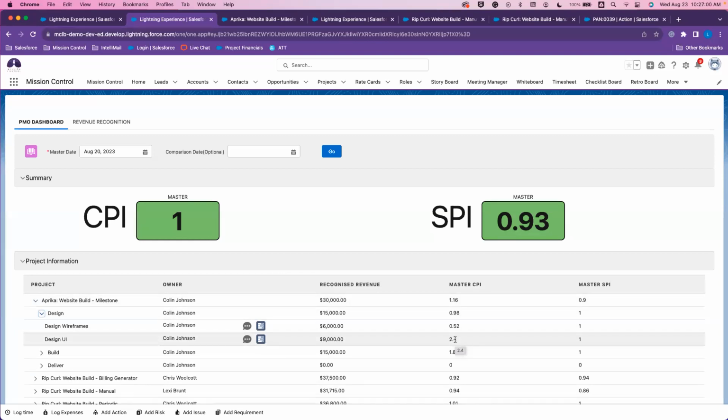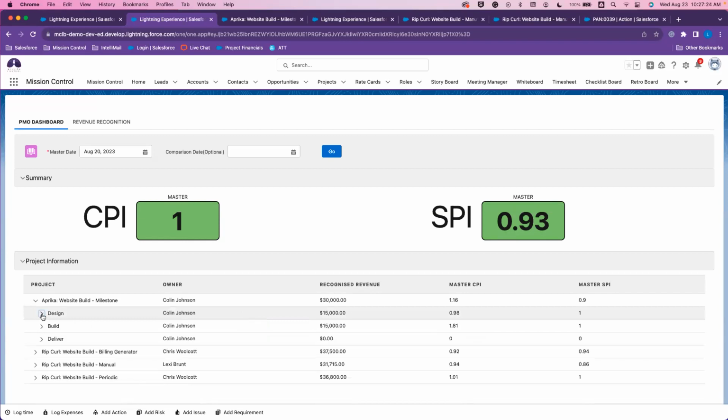So you can have some differences there. What this could mean is I might have had to schedule a different resource. If I set a resource on my action and someone else needed to complete the work, but they are billed at a different rate, then that can cause a difference in my revenue here.